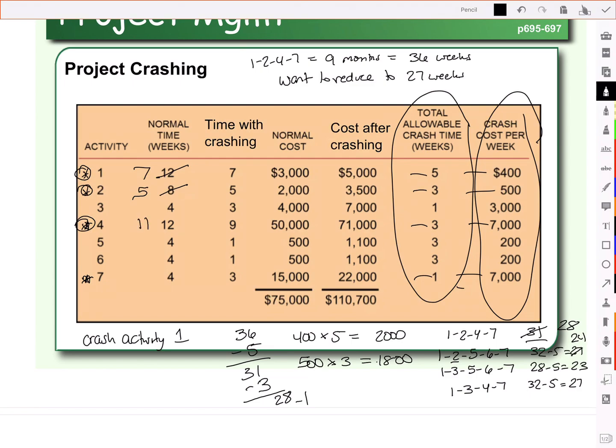So we're going to take it down to 11. That 1 week is going to cost us $7,000. And now we're at the 27 weeks that the client wanted.